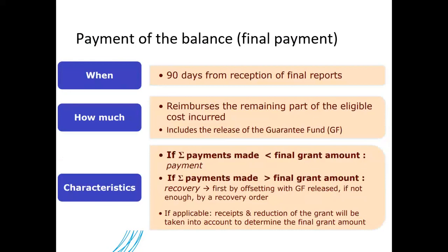So in this case, of the final balance, if the payment is less than the final grant amount, there of course will be payment. However, if you have incurred less costs than what you have already received, then there can be a recovery, and you will have to pay back the Commission the money which you did not spend.